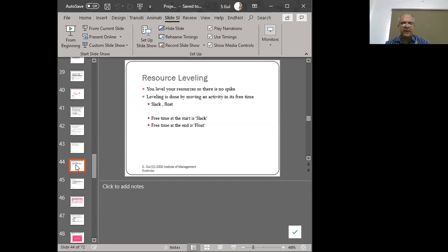So if there's a 90 hour task and I'm given 80 hours and the other person is given 10 hours, clearly there's this mismatch. They're only doing 10 hours of work, I'm doing 80 hours of work. So the leveling means that we both get 45 hours of work, or I get 40 and he gets maybe 50, or some close enough balance should be there, right? So we should be leveling these activities.